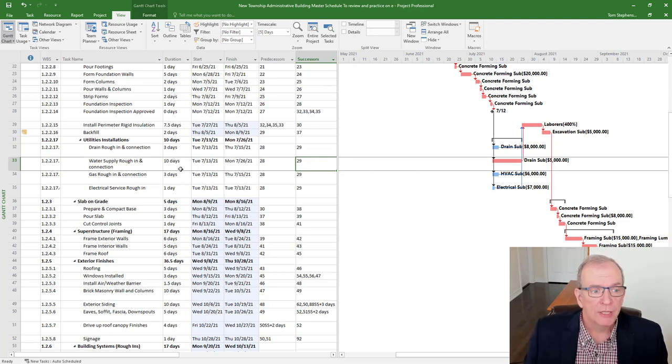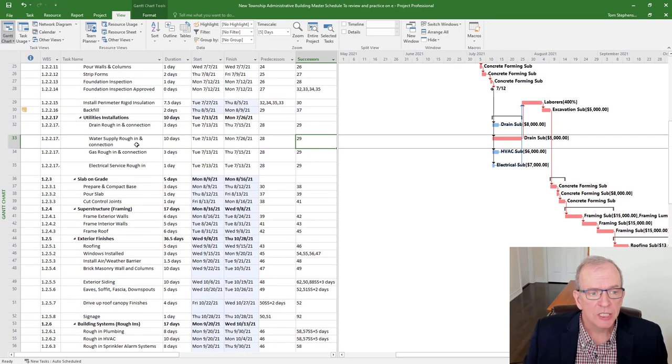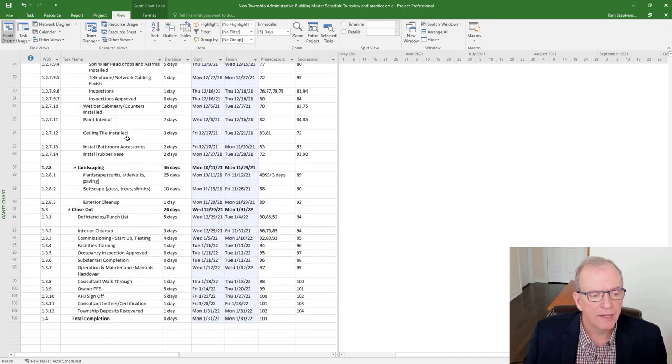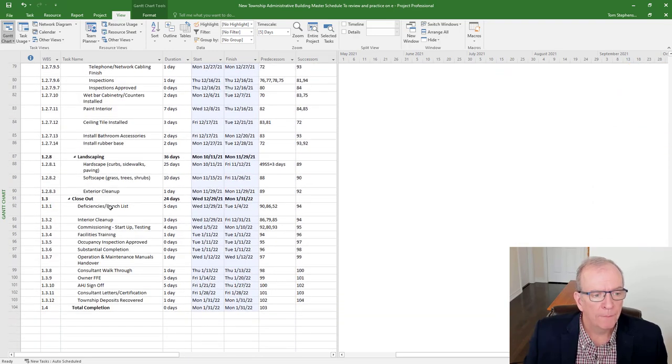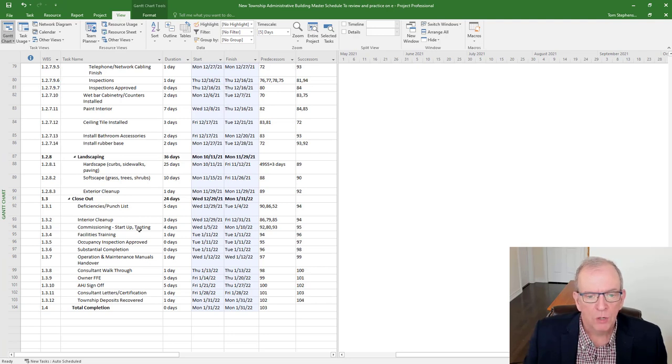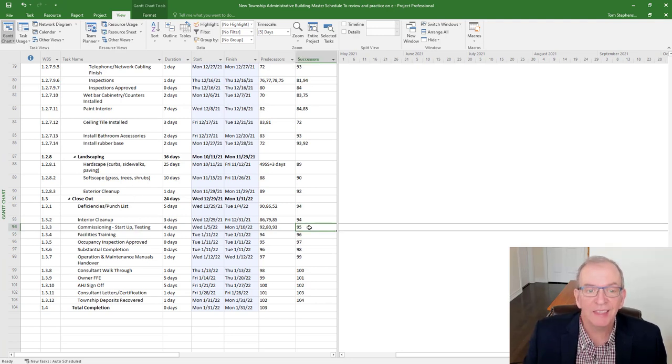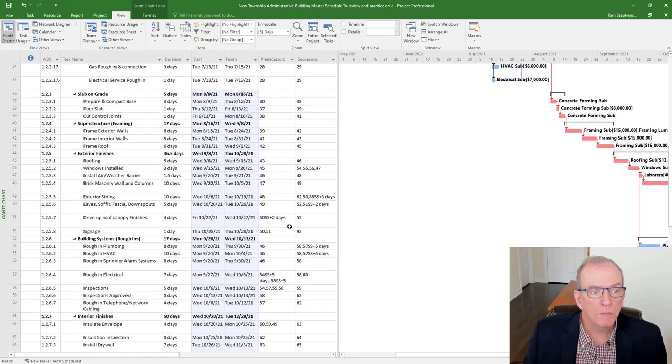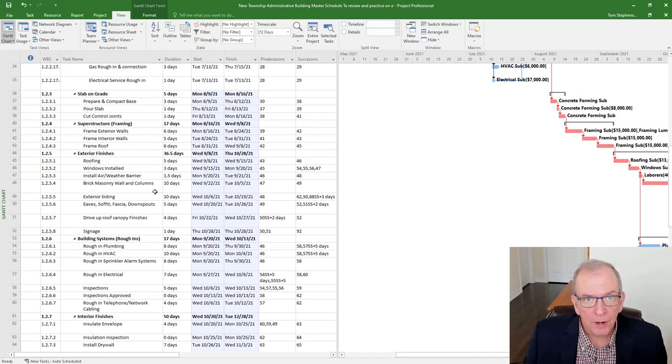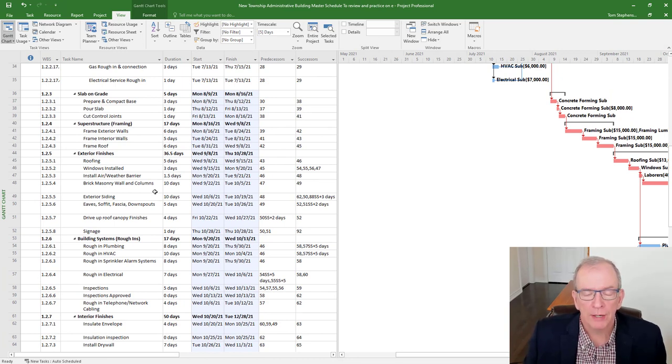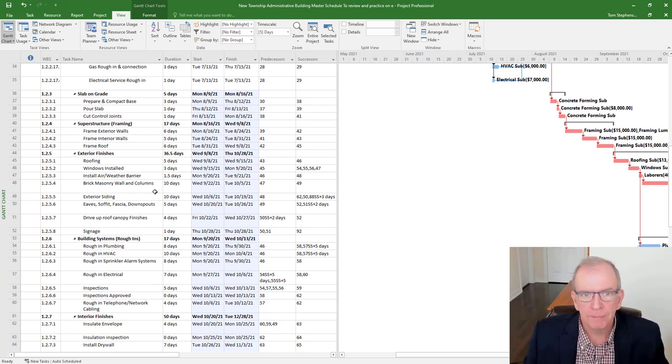Well, my answer to that is, okay, well, let's say this didn't connect to anything in construction. It would connect much sooner, but let's say it didn't connect to anything till project closeout. Maybe it's in the commissioning, the startup and testing. Well, if it didn't connect to anything till then, then connect it to that. Because my next question to you would be, do you need this to finish the project? And then usually they answer, yeah, of course, it's part of our contract. Well, then connect it to something near the end.